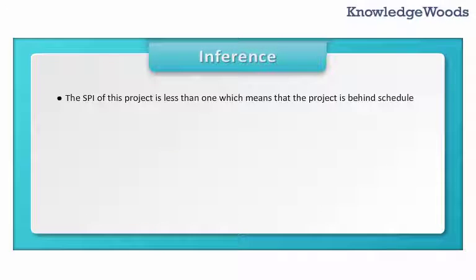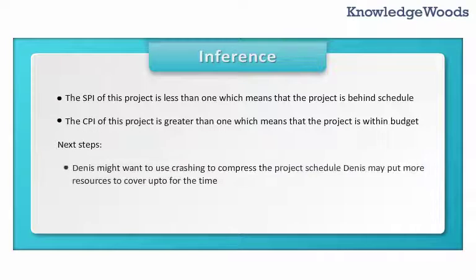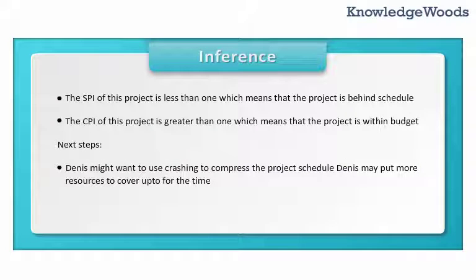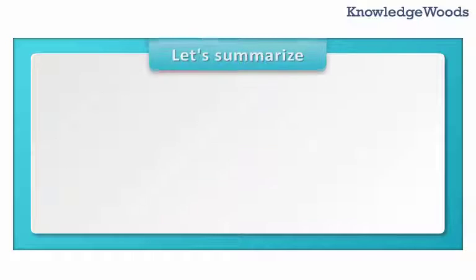The SPI of this project is less than 1, which means that the project is behind schedule. The CPI of this project is greater than 1, which means the project is within budget. For next steps, Dennis might want to use crashing to compress the project schedule, or put more resources to cover up for the time. This may require more money, but the project has a good CPI.